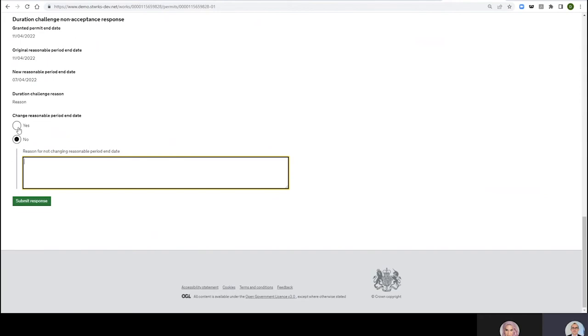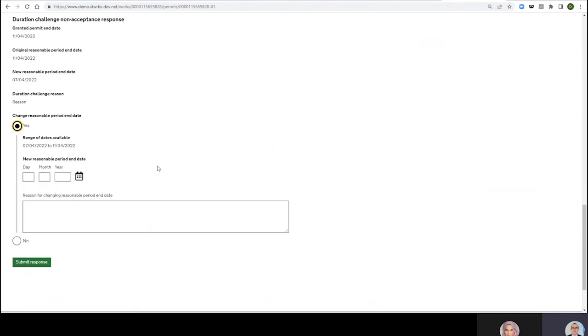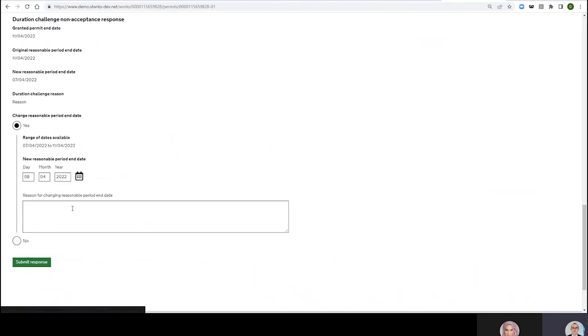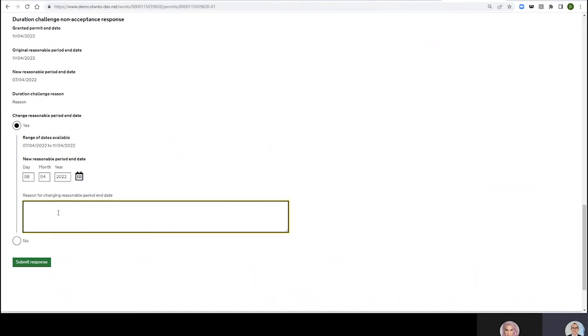Change Reasonable Period End Date, that is more interesting. You can see here range of dates available. We've got the 7th which is what I challenged it back to as the highway authority, or the 11th which is the date that was being asked for in the first instance. So I'll tell you what, we'll split the difference and we'll go for the 8th. You can have until the 8th but not the 11th. Submit Response.